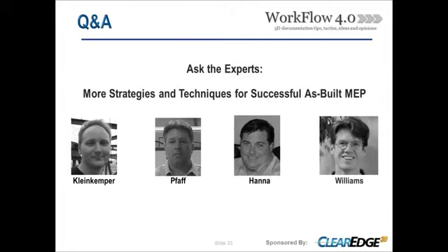We figure 10 to 15 minutes per setup. Is that what you guys are kind of thinking when you do your estimates? We count 20. Hopefully we go faster than that, but just to not stress the tech out with the instrument, we try to give them 20 minutes per setup.